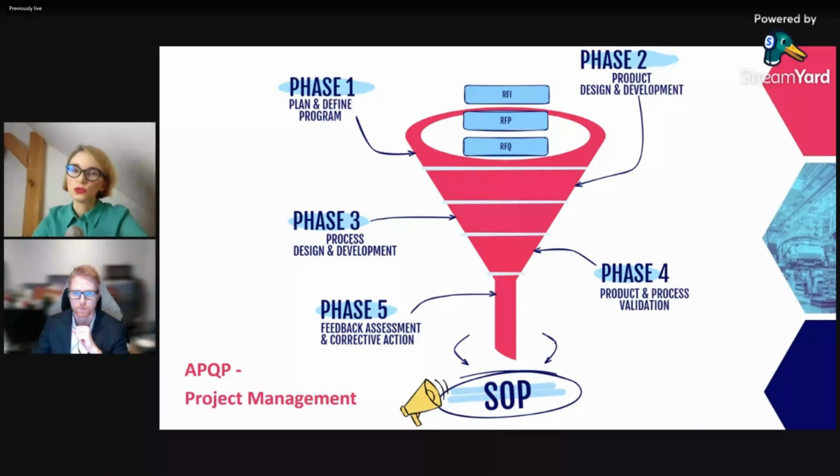However, this is all together, because let me emphasize that project management, APQP or VDA MLA, what we have in automotive, starts with recognizing the requirements, but somehow the requirements must be gathered. And here there is one tricky thing: the question of who is design responsible. Am I getting the full design already at these initial steps, which Christopher discussed a second ago? Or am I responsible, meaning my organization will be doing design and development? Because then we will approach recognizing those key requirements differently.